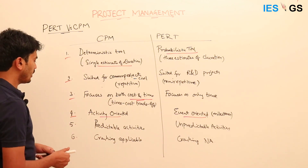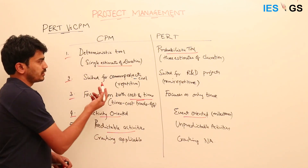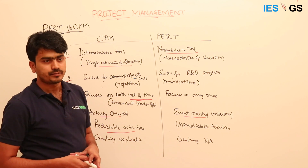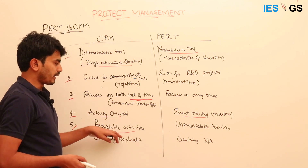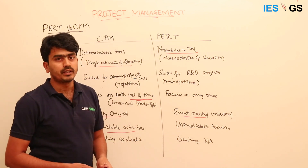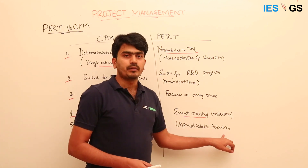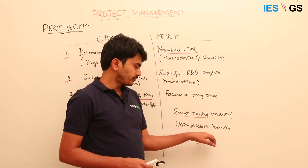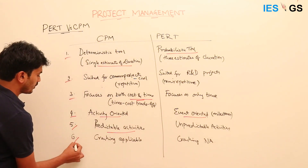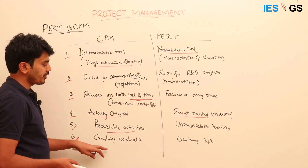The fifth difference: in CPM, activities are predictable because they are repetitive in nature and we know how those activities happen. In PERT-based R&D projects, activities are unpredictable in nature because we are not sure how much time they will take.